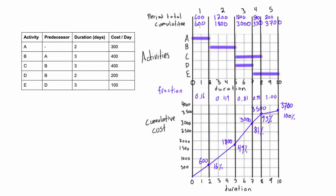All you do is you just divide the cumulative cost up until your period, at the end of your period, divided by the cumulative cost of the entire project. And you'll get these percentages. And then you can plot them on the graph, just like you would if you wanted to label these points with the cumulative costs of those points on the project S-curve.